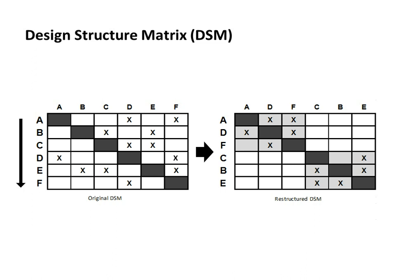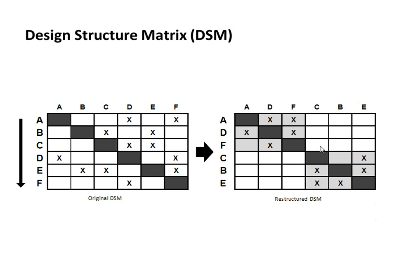Dependencies are indicated as X's here in the matrix. So, if you look at element A, if this is a person, it means that person A depends on person D and F for information in order to complete his or her tasks or make decisions regarding the tasks. What the software tool does is that it has an algorithm that takes this information and restructures it to create clusters of elements where you minimize the number of interdependencies across clusters and maximize them within clusters. The software tool does this by moving the elements, so if you look at element D, for example, you can see that it has been moved up two places in the restructured DSM here on the right.